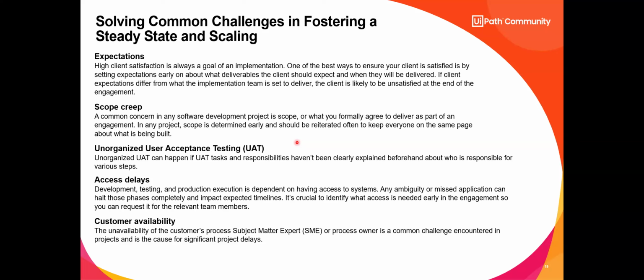Those test scripts and that UAT test model should be very clear, very simple to understand, laid out in a process in a way that people can readily look at it and understand it. You don't want to have all these pathways. You want to do a simple Excel spreadsheet with your tests. You want to have simple test results, pass, fail. You don't want to say almost passed, almost failed. You want to have pass, fail.